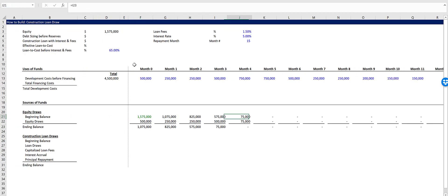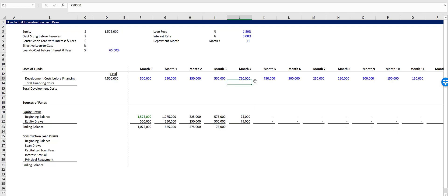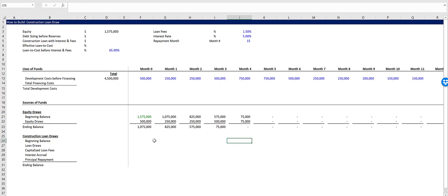And over here in column J, you can see that there's only $75,000 left in equity, but we need to fund $750,000. So we fund that 75,000 and then the rest of it, the $675,000, is going to flow down to the construction loan. And so we can start to build that out next.